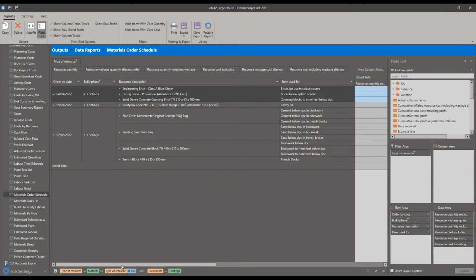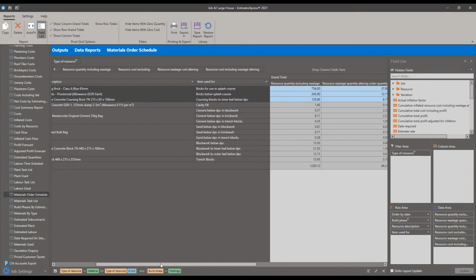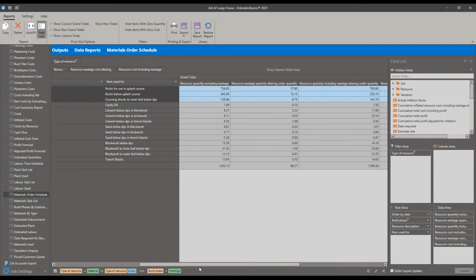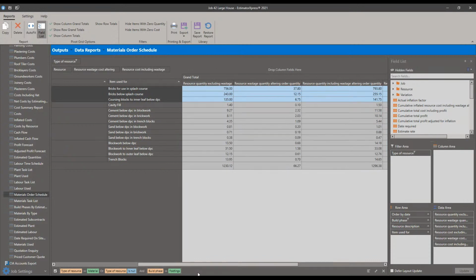And these are just going to be the materials, as I scroll across now, that are needed for that phase. So I'm not over ordering. If I do have the space on site that I can store more materials, I can store all the bricks. If I do have a, say, a small compound or lockup I can put materials in, then go ahead, order everything in beforehand. Make sure you've got enough bricks to finish the whole job in one go. Yeah, you might want to order the roof tiles much earlier and have them in the compound, locked up securely.